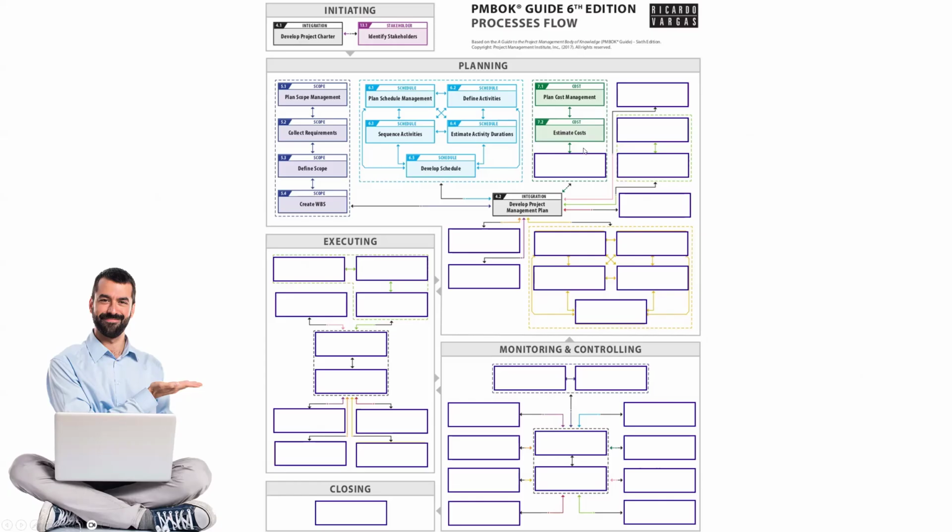After that, I make my estimate against each activity which has been identified in the schedule. Naturally, I have a list of all the activities already. So against each activity, I would calculate how much money is required to do this job. That is my detailed estimate for each activity. And once I have created the whole estimate for the project, I will submit that to my bosses and will have a debate with them, and ultimately whatever they allocate me would be the budget.